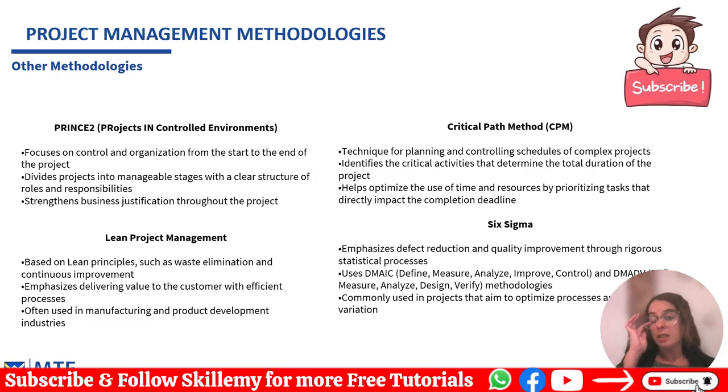So another method that we see here is the critical path method, or CPM. This is a technique for planning and controlling schedules in complex projects. Developed in the 1950s, CPM is ideal for projects with tight deadlines and interdependent tasks, such as in construction, IT, and engineering. The main objective of CPM is to identify the sequence of tasks, known as the critical path, that determines the project's total duration. This critical path includes the tasks that directly impact the completion deadline. Any delay in these tasks will delay the entire project, so they must be carefully managed to avoid extending the project's timeline.